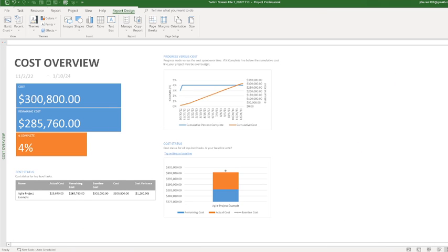Okay, so this is our cost and total. This is what's remaining. That's our percent. So we have a cost status here. So we got the actual, our remaining, what our baseline was. This is the cost column itself and our variance. So we are under budget here because again, we're not burning enough resource hours to catch up and meet that date that we specified.